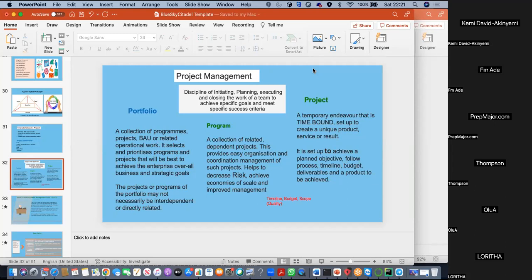You can imagine if the electrician comes and they've not started the house. For example, I want to build a house and I've contacted somebody that will do the electrical work. Will he be able to come and just start his electrical work without the bricks being laid? The blocks have not been laid, nothing. And he just says, these bricklayers are wasting my time. Will he be able to start running cables?